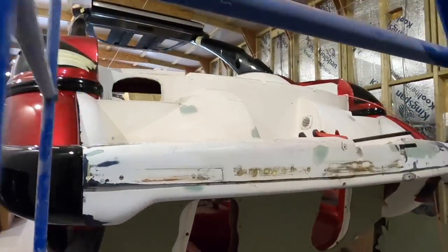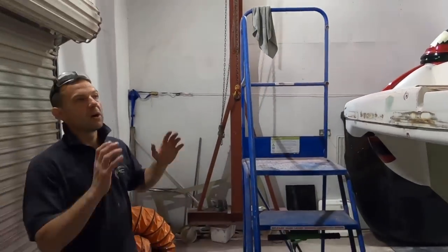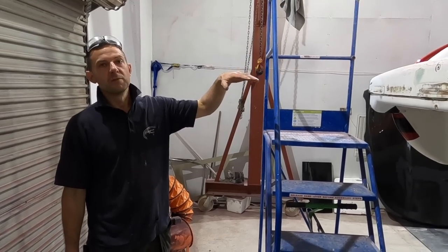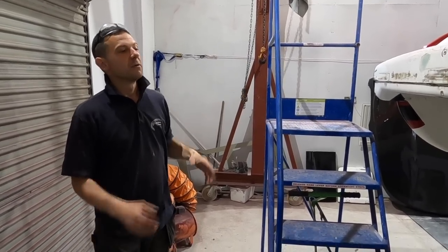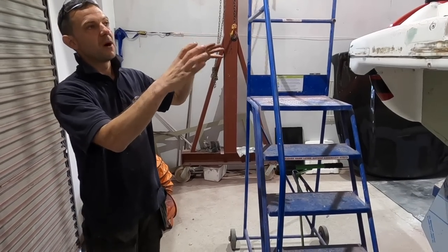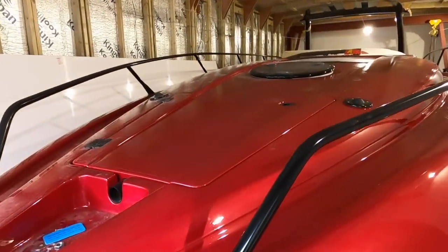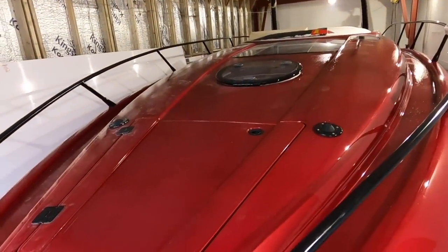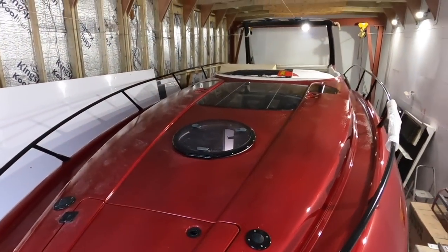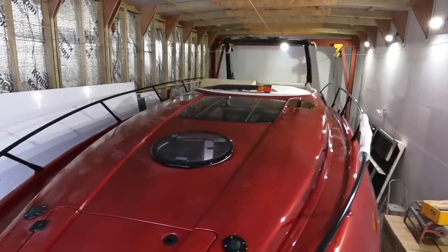The cockpit has been left due to engines still needing to be fitted — it'll be a high-traffic area, and there are modifications to make to the engine room to cut things out for the new engines. So the next phase is engines in, and once we're happy with the major work done, we'll paint out the cockpit area. And that — that is sensational. That is going to be such a head turner when it's on the water.